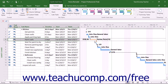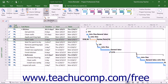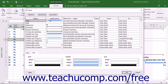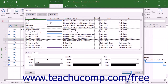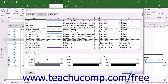You can change the appearance of different types of task bars in the Gantt Chart by creating a new bar style. To do this, click the Format button within the Bar Styles button group and then select the Bar Styles command from the button's drop-down menu. In the Bar Styles dialog box that appears, select a Bar Style Type to edit. For the selected type of task bar, use the choices that appear in the Text and Bars tabs at the bottom of this dialog box to set the appearance of the task bar and its label in the Gantt Chart.